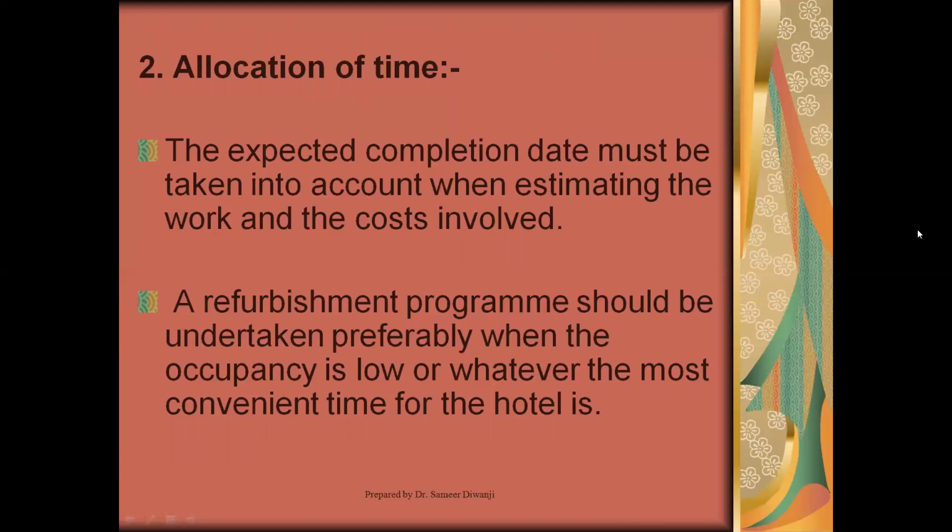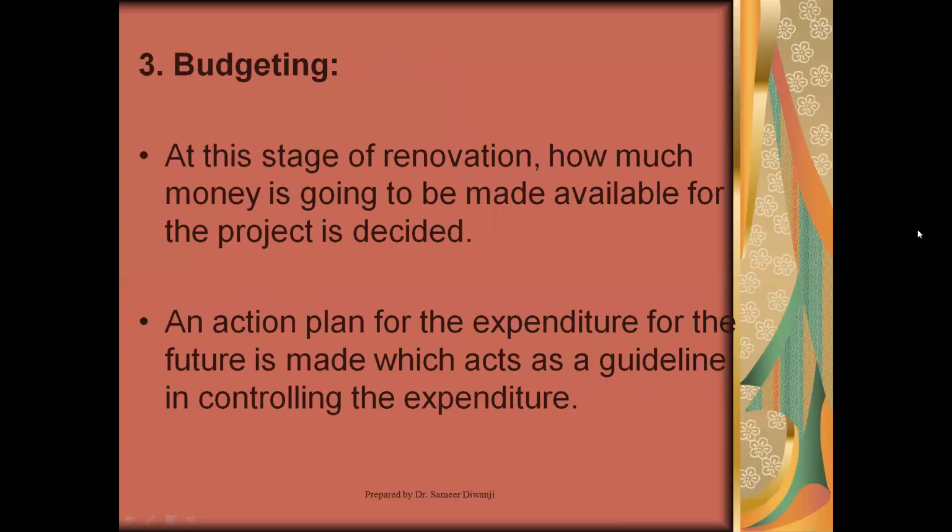So do you take it in peak time? No. You try to look at a very valley period or shoulder period, or when occupancies are typically very low. All right. And then the refurbishment program is carried out. So you reduce the expenses in a way by offsetting what you would lose as business because of refurbishment, to a minimum. So the refurbishment program should be taken when the occupancy is low so that you don't lose out on business.